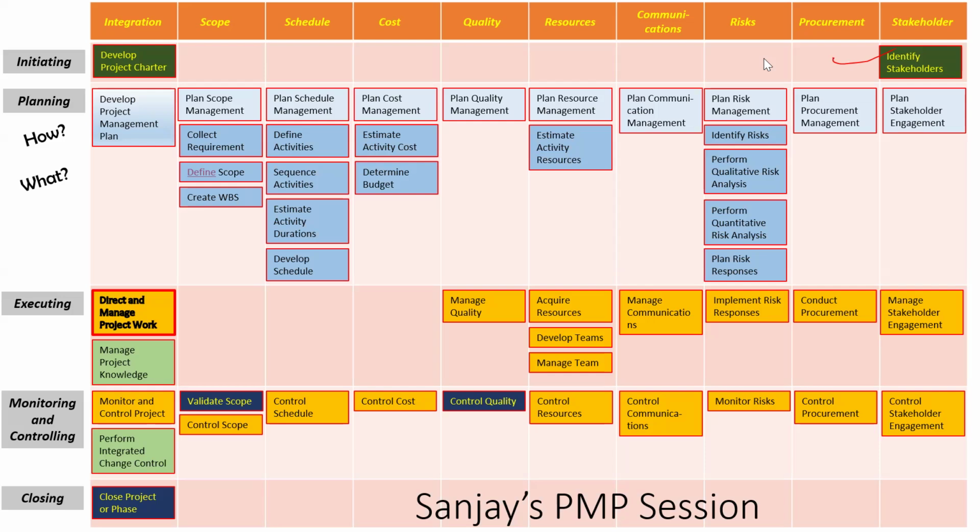Correct? During one of the requirement collections, one of the users might say that this particular functionality, as I am explaining, Shishir, should be there. But before you freeze it, go ahead and talk to finance. वो finance वाला तेरे को ना, he might be able to give you input. Did you notice now? You are going back into identify stakeholder. A new stakeholder got added called the finance department. Do you notice that? Very common, Shishir. So basically, what I am trying to say is, identify stakeholder first cut, first implementation will happen before collect requirement. Not that it will get completed. They will keep on coming later. And that's what they are trying to say.